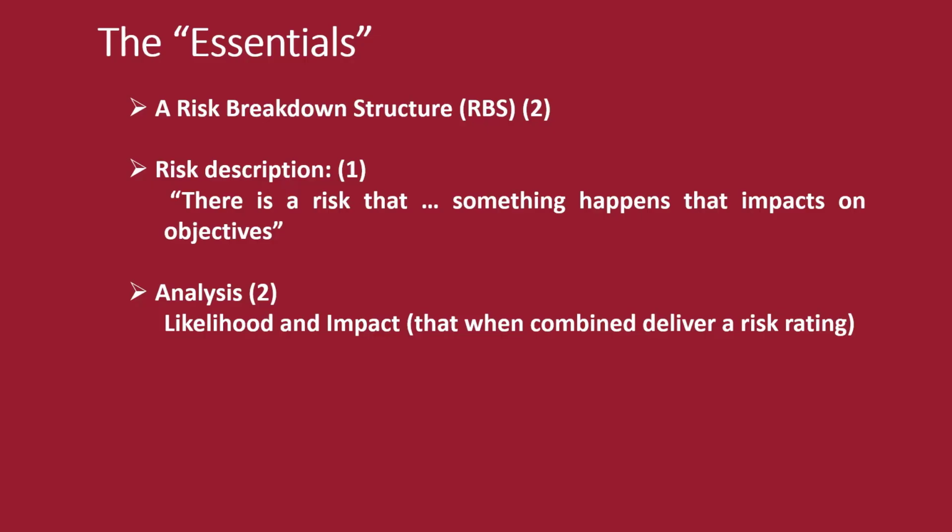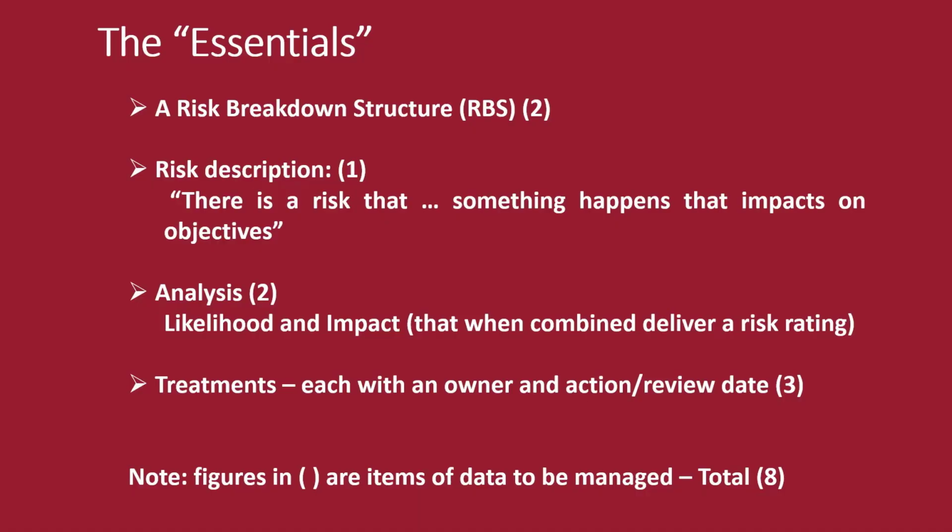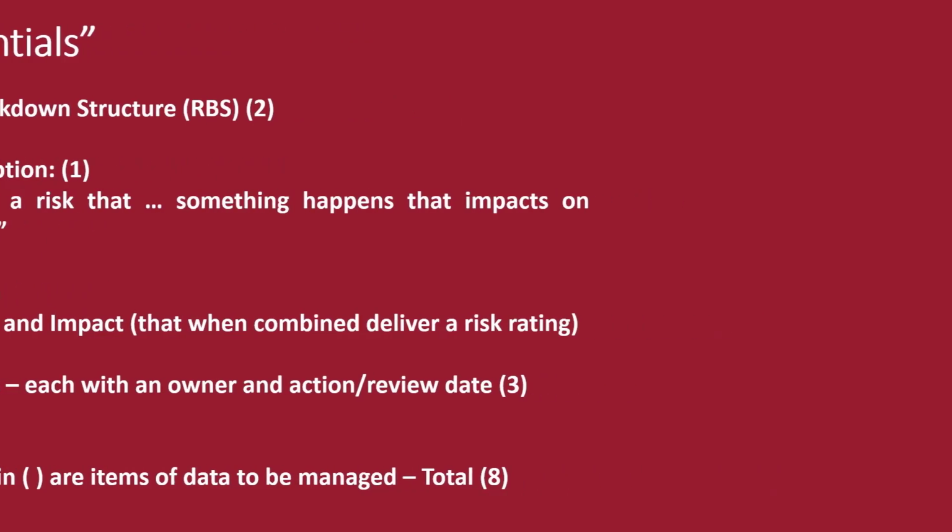Objectives are not only critical to analysis but form an important role in integration, and as with the RBS are discussed in more detail in stage 2. Finally, treatments need to be developed and implemented to reduce the likelihood and/or impact of the risk. Management of treatments is a critical activity, so each treatment must have an owner and an action date.